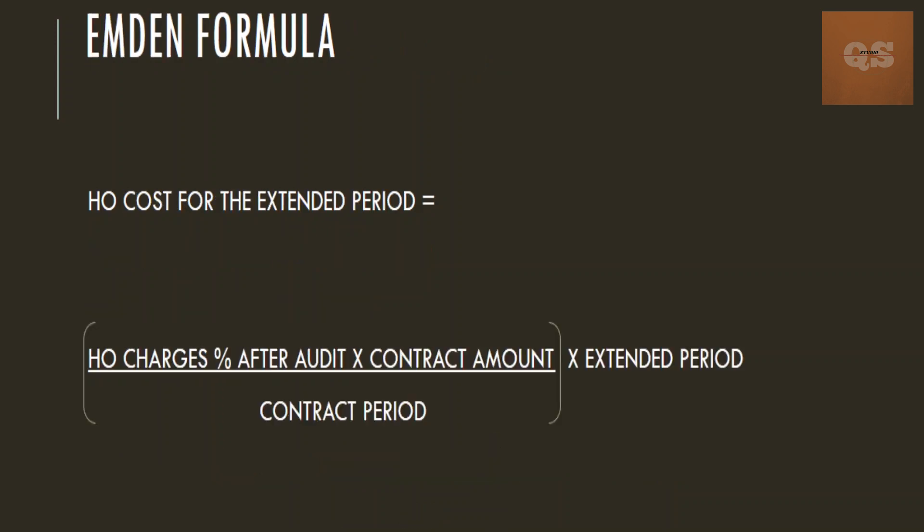That is the head office charges you have the right to claim for the extended period of 120 days using the Hudson formula. Next is the Emden formula. This formula can be used when the percentage of head office charges has not been mentioned anywhere in the contract, or if the client needs to know the exact head office amount incurred for this particular project. It can also be used if a dedicated team is working in your head office for this project, or when your company is exclusively working on this project and it is easy to identify the head office expenses. An audit will be done and the client may check all the invoices, bills, expenses, and proofs of all costs incurred in the head office for this specific project.